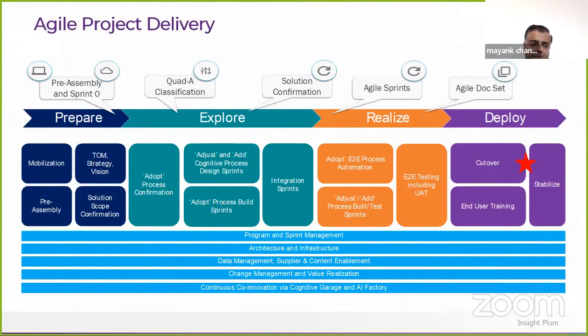These are some of the important design principles to consider. Now let's come to methodology. In terms of methodology, here's an example of a hybrid methodology, which is predominantly agile for the solution development or the solution delivery, but has elements of waterfall approach for things like project management, solution architecture, data management, things that you basically can do in very much defined stages and complete that process, and then actually in parallel do the agile sprints for your solution. So what does really an agile delivery consist of?